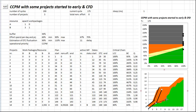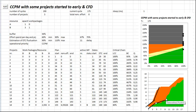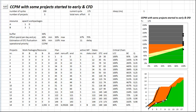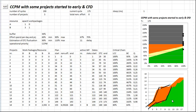If you start too many projects, then it looks like this. The inflow line is much higher and in that moment the outflow line is like this. That's a very dramatic situation. You have much more inflow and the outflow is decreasing and the lead time is increasing rapidly.